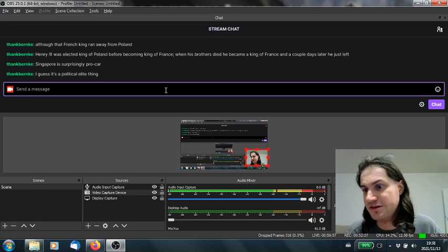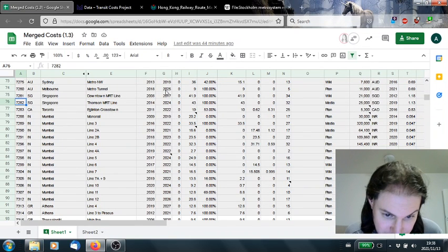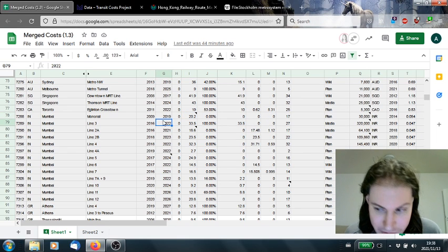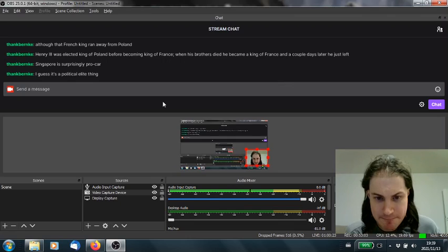So I'm going into things that are construction, but not really, because it's not an engineering thing. It's just a random decision in Singapore that when they build cut and cover stations, they're not going to disrupt traffic. That raises the cost, because they need to acquire private land for this. And when you acquire private land, that's expensive. It's Singapore. And so you have these really high costs there. And likewise, in the Nordic coasts.